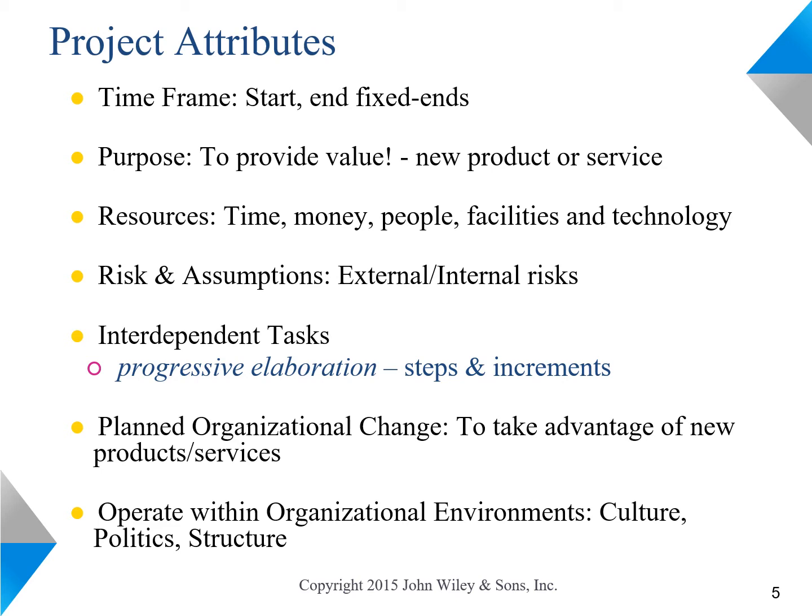In some cases, our end date may be fixed, meaning that we have to deliver a project by a certain date because of, say, regulations that are going into effect at a certain time. In those cases, we basically work our way backwards and figure out what start date we need and what level of resources we need to be able to finish by that end date.